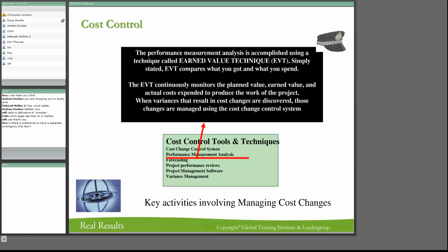If something gets done more quickly, obviously you're going to find that the budget is going to get slightly cheaper, because if you're getting things done more quickly, then you are probably going to save on labor costs. If you start going over by a certain amount, say you're going over by 10%, it's going to have an impact on your cash flow all the way through the project. That's why forecasting is important.